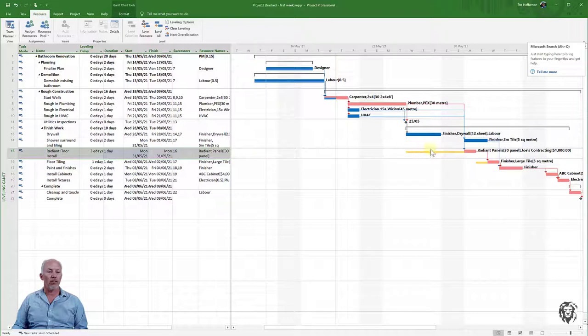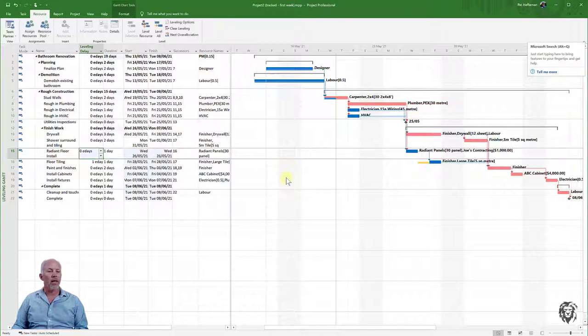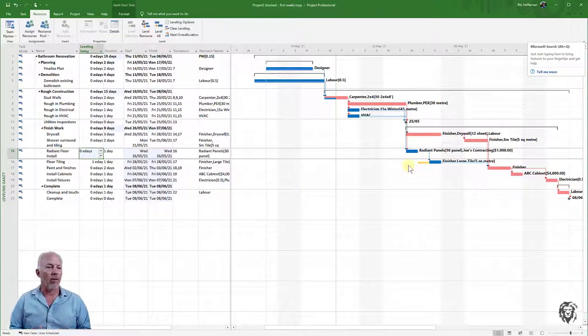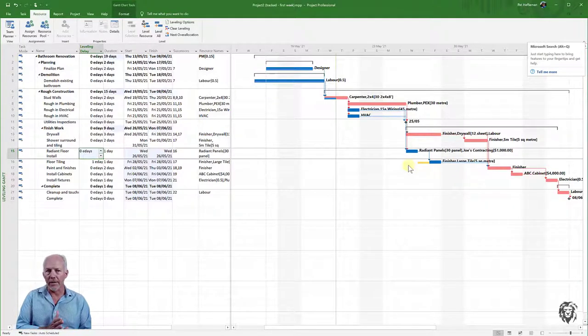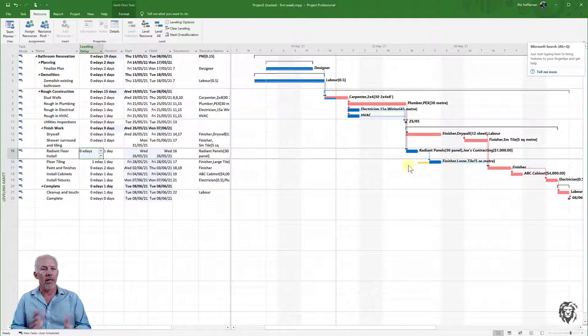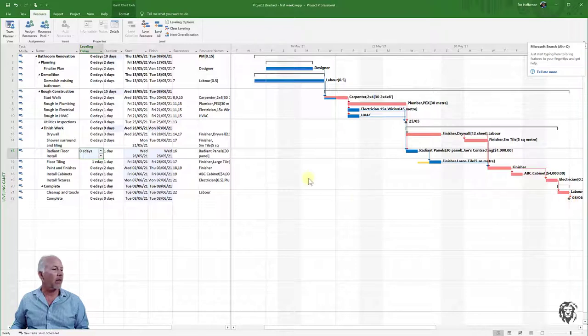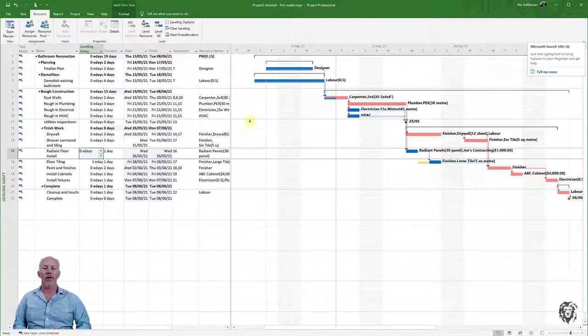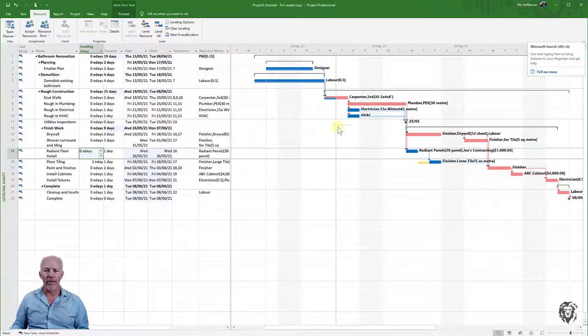Now we've swapped it out. We have the cost of the contract plus the panels, so we're more expensive. We're still taking one day to do it, but now we shouldn't need this leveling delay. I can bring that down to zero. We're obviously saving time on the overall project. That's one method—getting rid of leveling delays by either adding resources or changing the manner in which you're approaching the task.